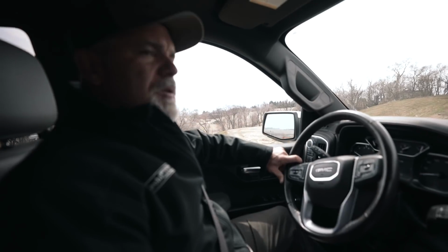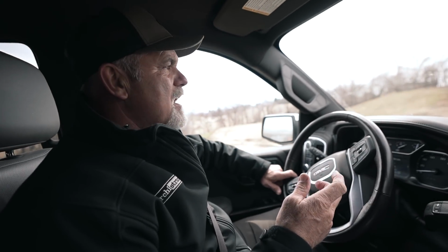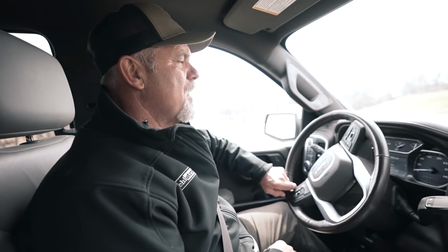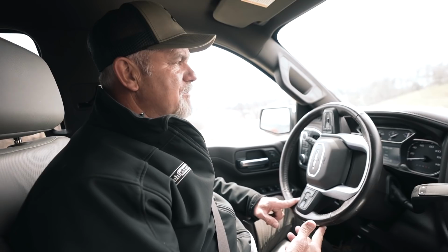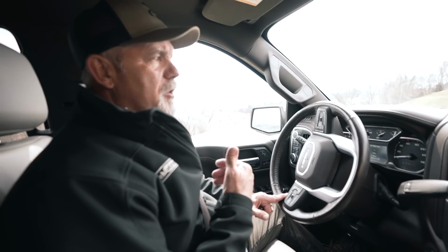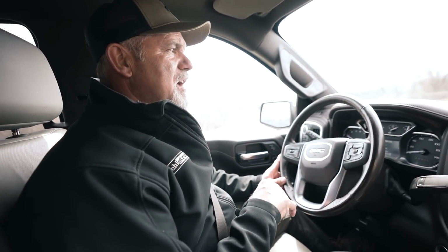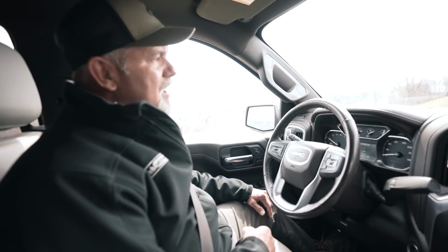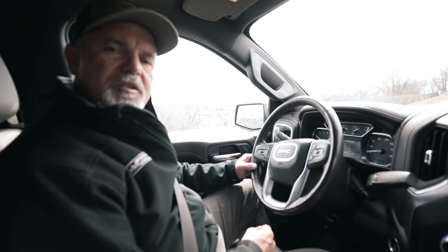Okay, guys, I think that was beneficial for me to come out and take a look at the job. This next week, if weather holds, we should be able to get the roof felted, get that finished up, get the Tyvek wrap going around the house, which will allow us to get the windows installed. Some of these windows, we ordered a good 5 months ago. I believe they're in. So once that gets done, then we'll get our backfill in the basement, get the concrete floors poured, and then we'll continue framing downstairs. All that will probably take a good 2 to 3 weeks. So I'm real happy. I hope Andrew's pleased with this house, and thank you so much for watching.